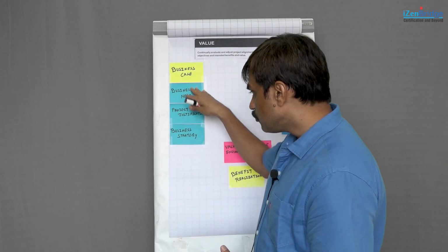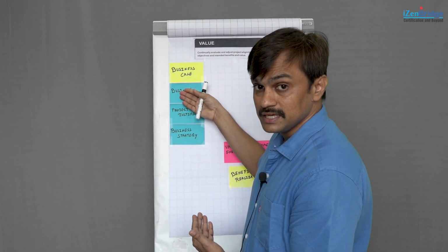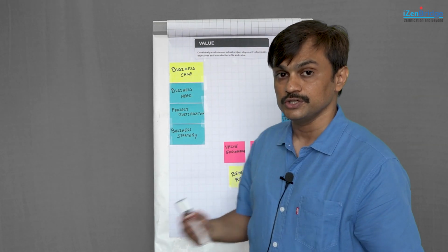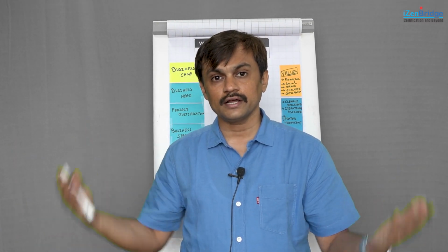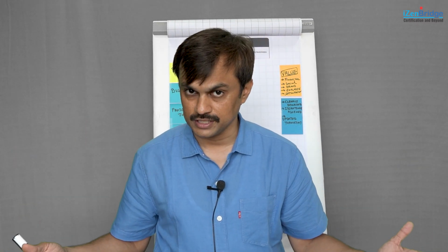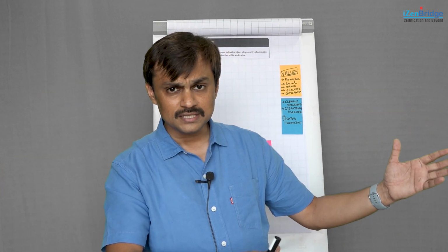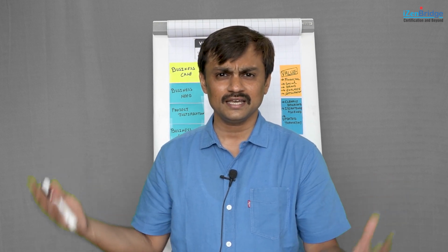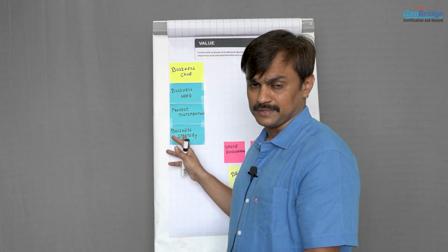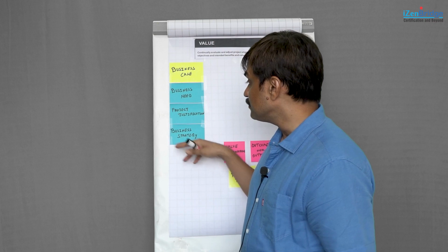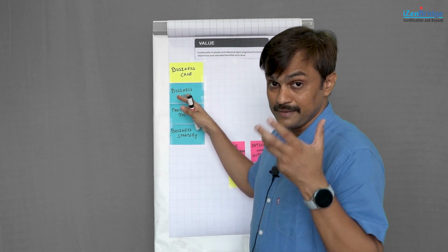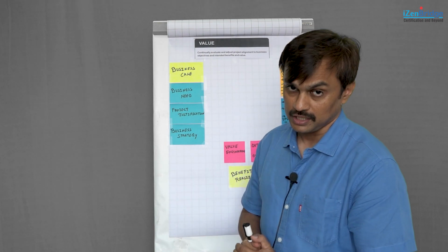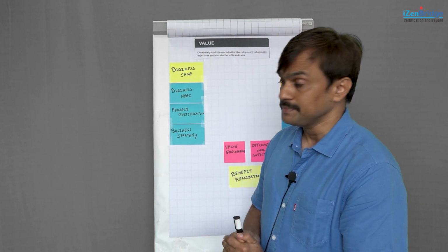And the project justification as well as the business need should align with the organization's strategy. Say the organization should continue working in the manufacturing space. If the organization is thinking of exiting manufacturing and getting into some e-commerce business, then it does not matter if the operational cost of manufacturing units is increasing, because we are anyway exiting that business. So, business strategy ensures that this business need really matters, and project justification shows that by doing this particular project we can take care of this business need.